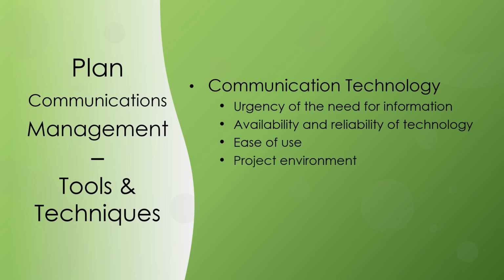Project environment. Whether the team will meet and operate on a face-to-face basis or in a virtual environment. Whether they will be located in one or multiple time zones. Whether they will use multiple languages for communication. And finally, whether there are any other project environmental factors, such as various aspects of culture, which may constrain the efficiency of the communication.